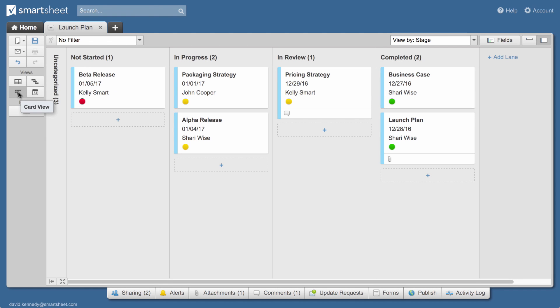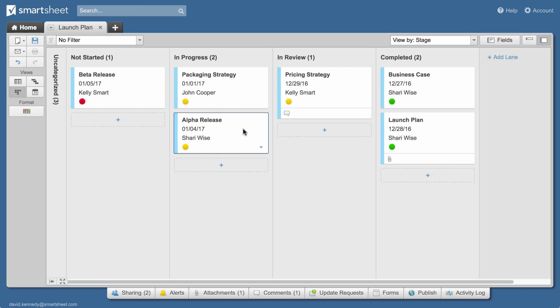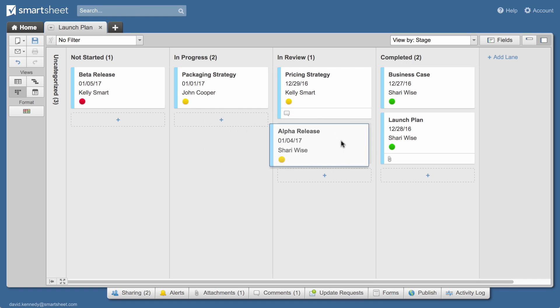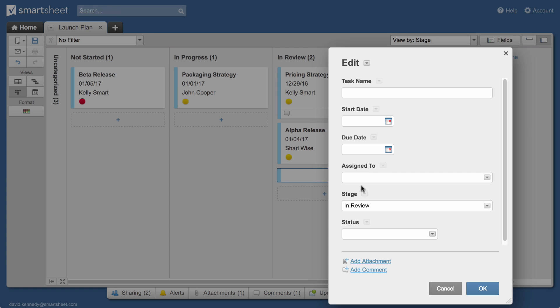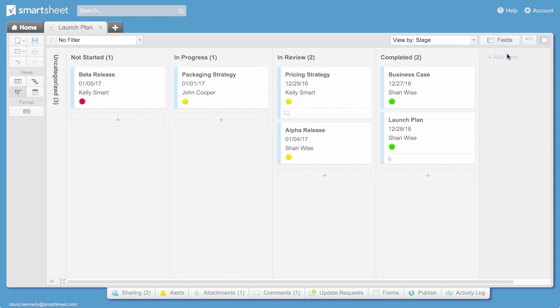In card view, different columns called lanes correspond to the options from your drop-down list. In this case, the cards are organized by stage: not started, in progress, in review, and completed, because the stage column is a drop-down column in the sheet we created. You can rearrange cards and add cards. Each card you add becomes a row in your sheet.